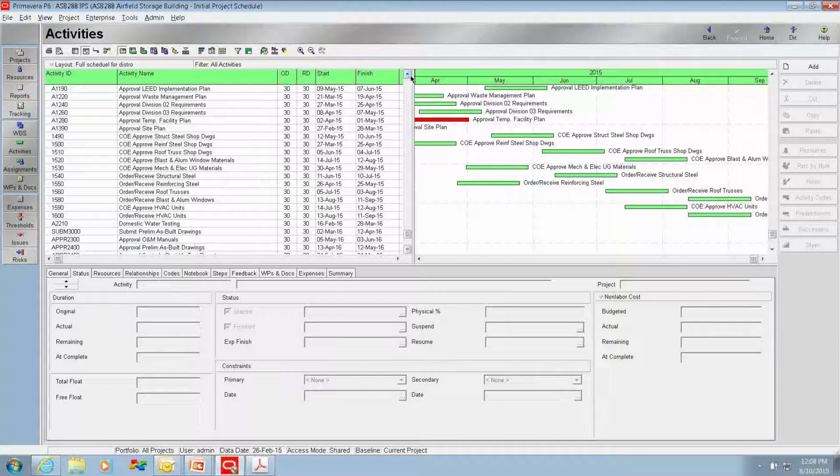One thing in reviewing your durations for your submittal activities, you want to validate whether the number of days the contractor is providing for government review is the same as what is provided in the contract. If you're given 30 days to review a submittal, you want to make sure the contractor is not cheating you by perhaps giving you 14 days.